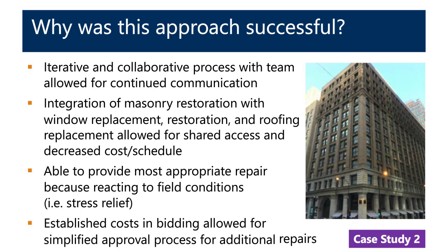Here, we were able to provide the most appropriate repair because we were reacting to field conditions, such as that stress relief that I talked about earlier. And because the scope documents established costs in the bidding, it allowed for a simplified approval process for additional repairs, for things such as the additional cleaning.